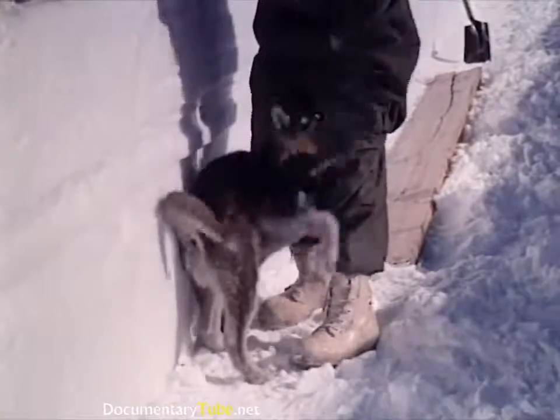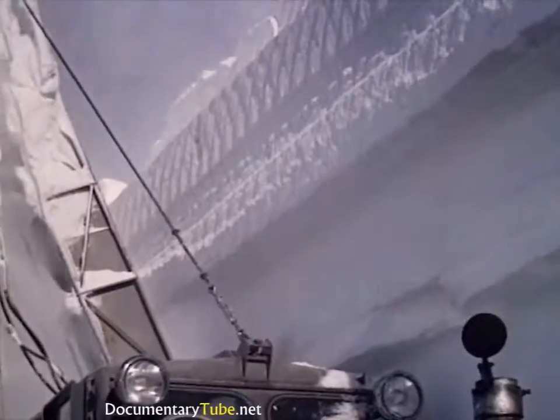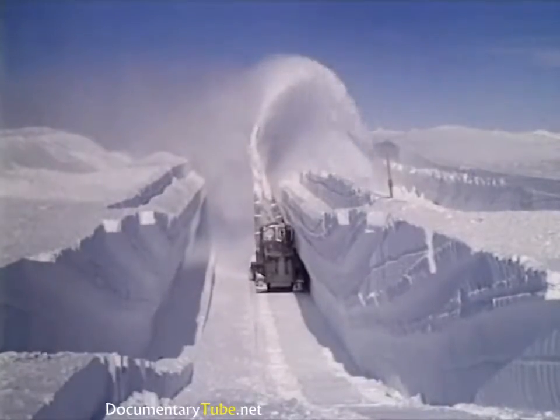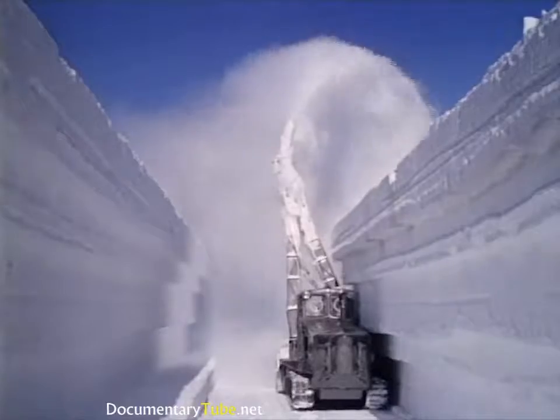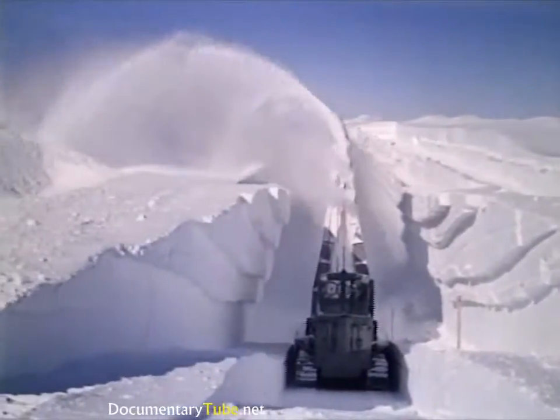Camp Century was starting to grow, and so was Mukluk. We used 3 Peter plows to cut all the different trenches we needed. By making a series of undercuts, the width of most of the lateral trenches was greater at the bottom than at the top. This cut down on the amount of roofing material required.